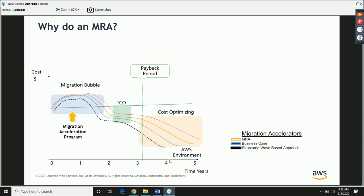And that is purely because the MRA is your planning phase. MRA is where you get to know all the details about the customer. You get to know what pitfalls are there. If there is a particular person who is going to be a naysayer in your migration progress, you have to specifically put consideration to that person. If you have to work on a particular technical area, like maybe they have a certain old generation Unix platform which has to be taken up in a different kind of migration approach, all of these things you get to know in the very beginning if you do the MRA.